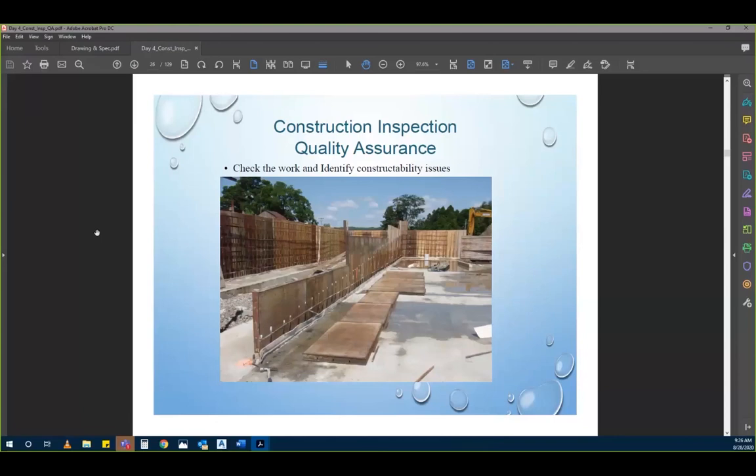If they're going to promise you after the fact that, oh, we'll get the water stop in after we pour the concrete and stuff like that, that's a design change. If the designer called for PVC water stop in the specifications, to be tied to the L bars coming from the floor, and the contractor decided that, no, he's just going to use a bentonite strip, that is something you need to have a conversation with the design approver about before you proceed.